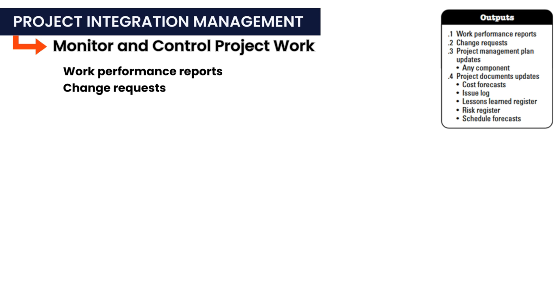Change requests arise from comparing actual performance to planned results and may involve adjustments to the project scope, product scope, quality requirements, or project baselines, schedule, or cost. These requests could also lead to the collection and documentation of new requirements. Changes may affect the project management plan, project documents, or deliverables and must be processed for review and approval through the perform integrated change control process.